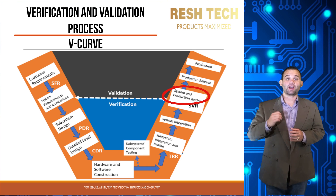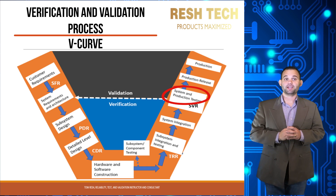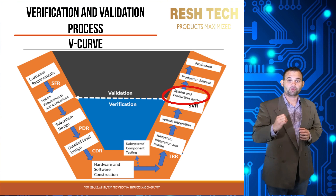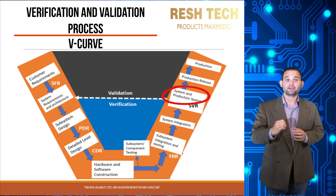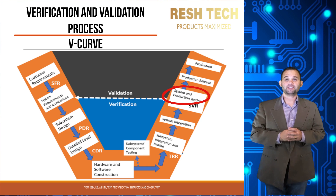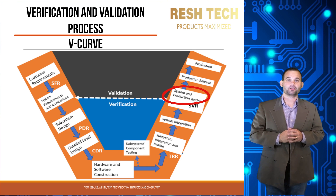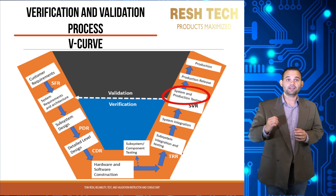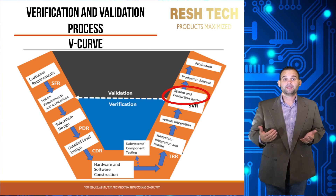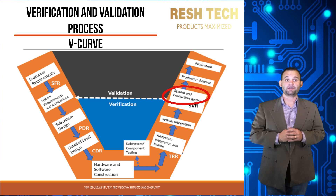Next is Design Validation, where hardware, mechanical, and software test plans tailored to customer requirements are executed. With good planning and sufficient design margin, validation testing should go smoothly. However, in the real world you will likely encounter issues such as minor software bugs, hardware and mechanical issues, hard tooling changes, component supplier switches, material additions, mounting hole relocations, and electrical or mechanical rerouting. These issues are common and can cost thousands to millions of dollars and cause days, weeks, or months of schedule slippage, so be careful and observant during the verification phase.